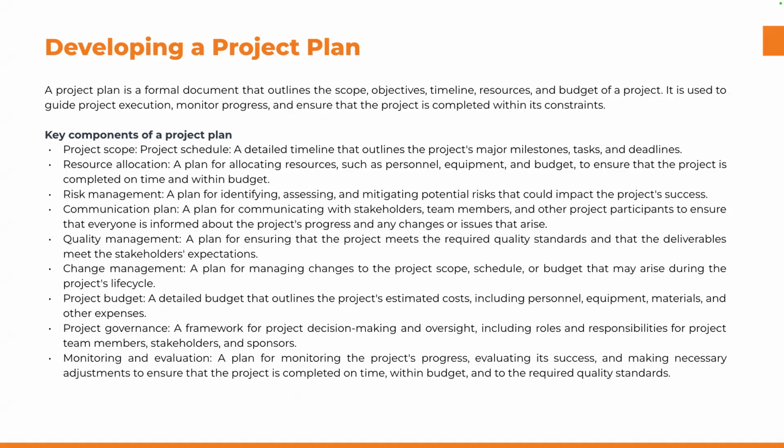So as a project manager, if you think about the cycle, what you're doing is basically saying these are the things that we need to do. This is what the client wants. So the client wants a 5-bedroom house. It's not for you as a project manager to say, yeah, guys, I think we can do this. We should be able to get it done in 5 months. No, you take it to the resources, you take it to the key people, and you get them to estimate that, oh, yeah, sure, this is going to take X amount of time. Does that make sense?